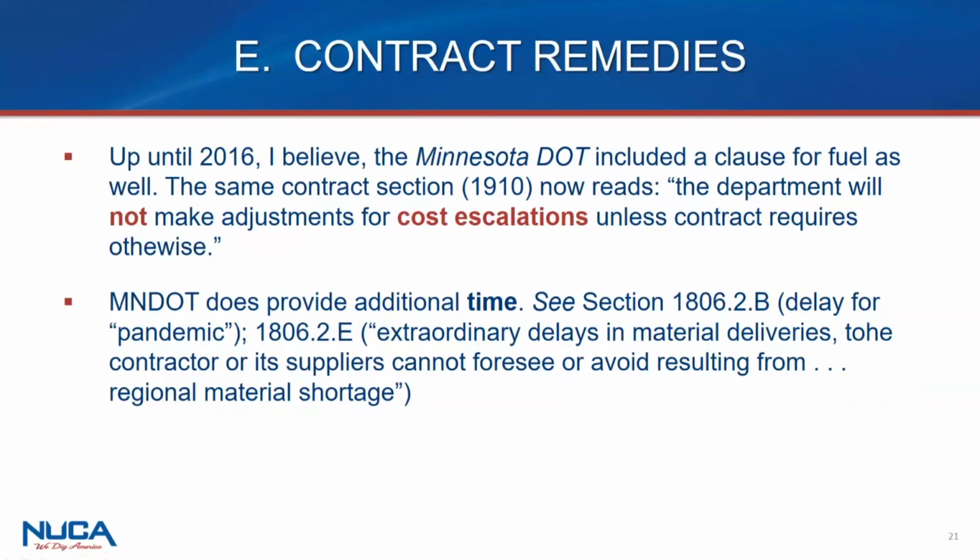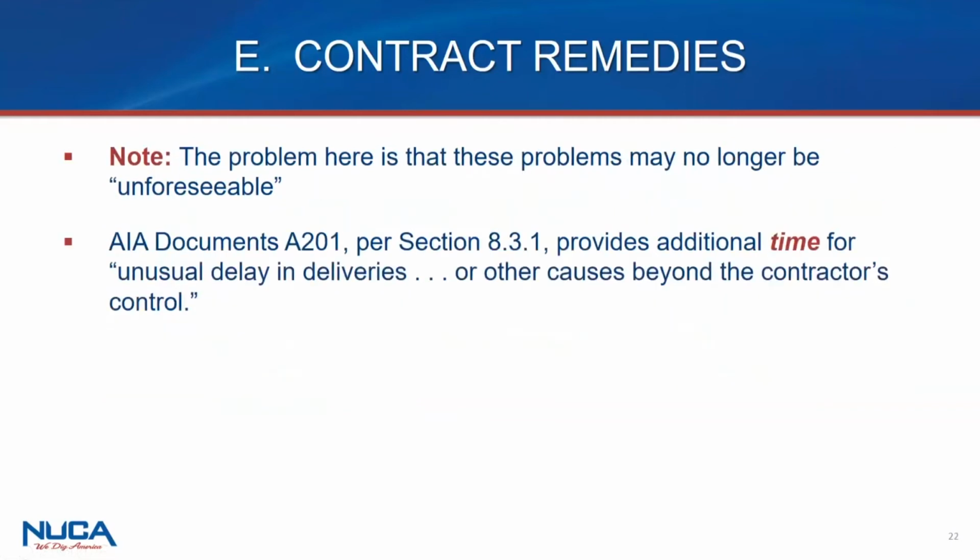While time is great to protect your back end from LDs, it certainly doesn't cover the extra costs associated with getting that material. And it might not help you with price increases related to the supply chain. Who knows if in 6 months the prices aren't even higher? So time might not be your friend.